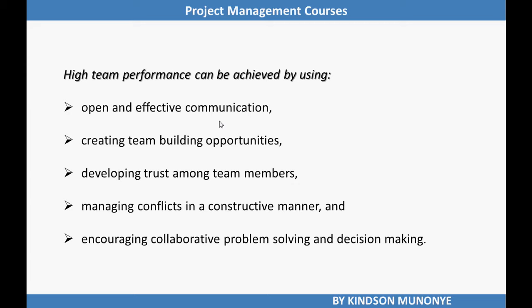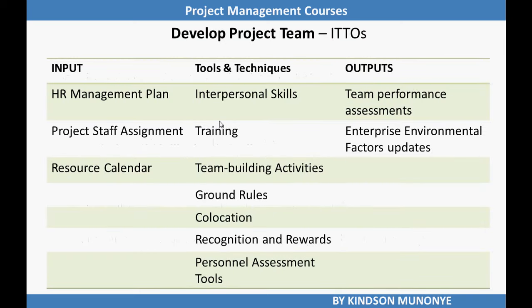Let's now go ahead to look at the ITTO of Develop Project Team. Of course, the inputs are the project management plan, the project staff assignment, and the resource calendar from Acquire Project Team.